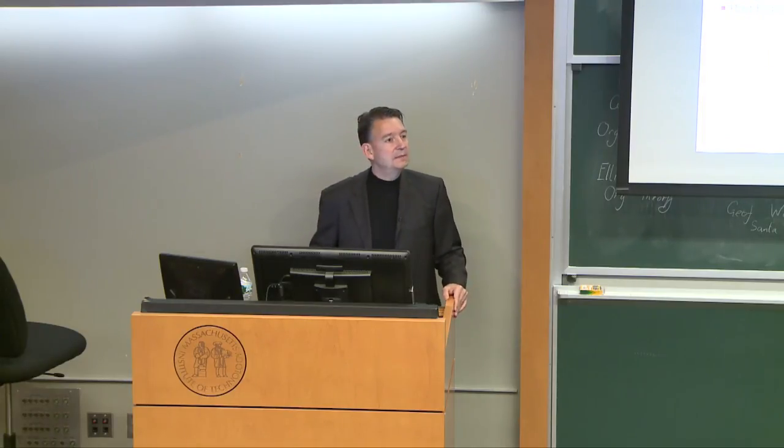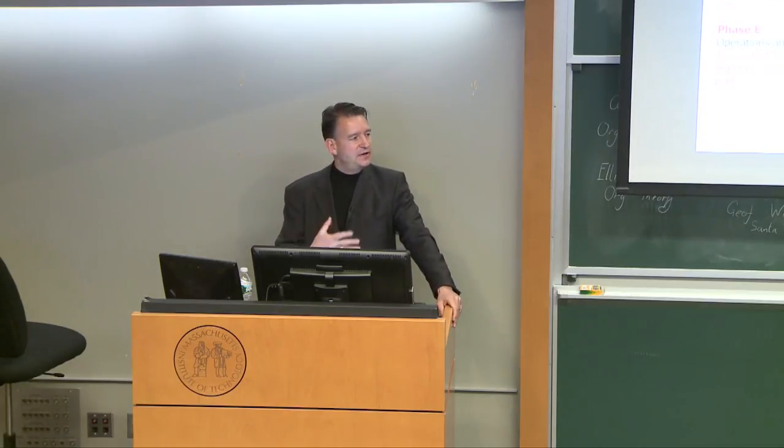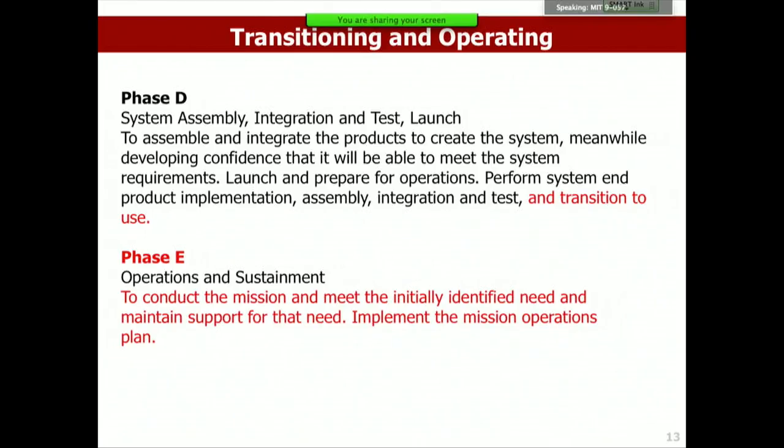All right, let me talk about commissioning. Commissioning is essentially the transition from phase D to phase E. Phase D is system assembly, integration, test, and launch, and transition to use. And phase E is then operations and sustainment: to conduct the mission, meet the initially identified need, maintain support, and then implement your mission operations plan. So commissioning essentially is transitioning from phase D to phase E.